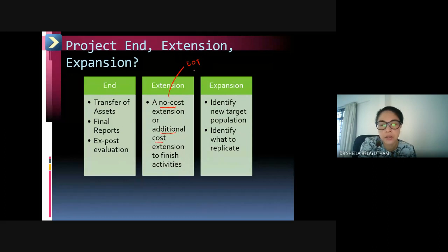Okay, so it has not been approved by the client, and your reasoning for the extension of time does not fall within the condition of contract. Maybe the reason you are giving is basically the fault is on you as a contractor. Okay, so maybe you do not have sufficient workers. Okay, the fault is on you, it is not from the consultant.